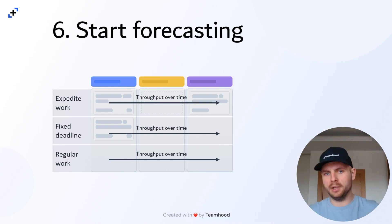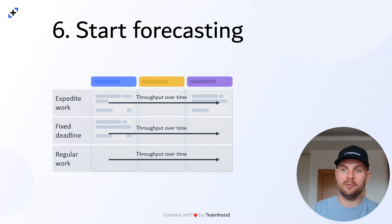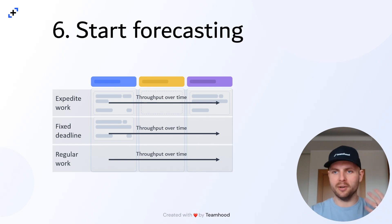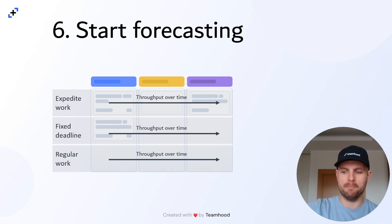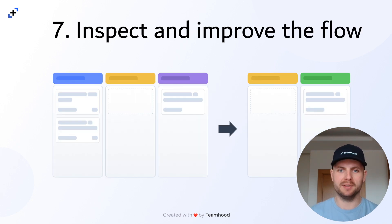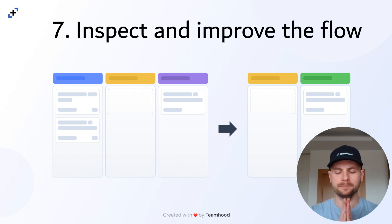There are other ways — there are Monte Carlo simulations, you can even do individual item forecasting. This is really the right, stress-free way to look at things and timelines, instead of agreeing on some estimated or subjectively set dates and then stressing about them. I know there are a lot of projects where deadlines are necessary and they're points of agreement, but you can still work with that. A deadline is also not precise — the same way your forecast can be not as precise as somebody would wish, but that's reality. And then once you have your measurements and your structure, you should keep retrospecting.